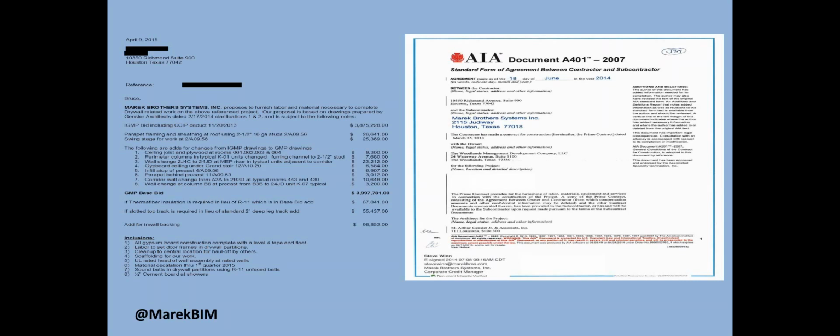We started the standard construct-as-you-figure-it-out process. So we'll find the issues that occur, submit RFIs, wait for answers, price changes, wait for approval, get approval after submitting the price 3 or 4 times, and then proceed with the work. And then we do the wash, rinse, repeat method of continuing the process.